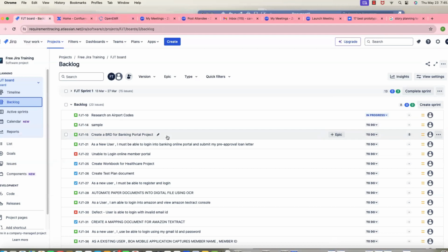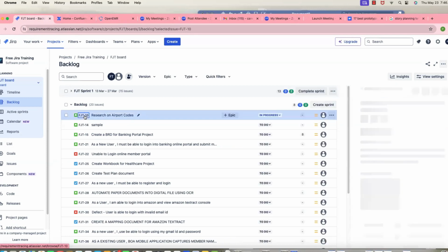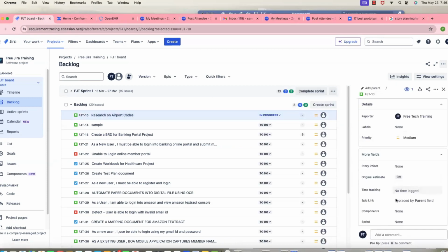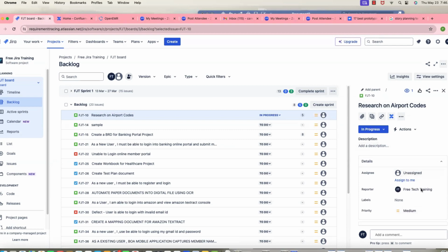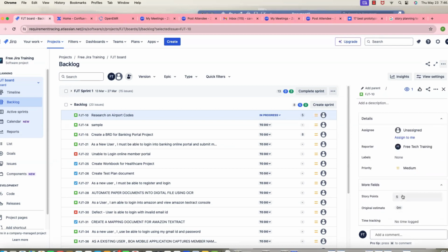So you're taking this and you're taking maybe an additional 10 stories. But the developer is going to do the development of the story. This will be an 8 pointer for him. So in that Excel sheet, we're going to combine all the points. So 3 points for the developer, 2 points for you, totally 5 points. I give totally 5 points. So this is a combination of developer points and your points. You're not giving only your points.